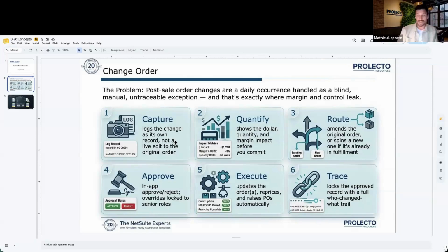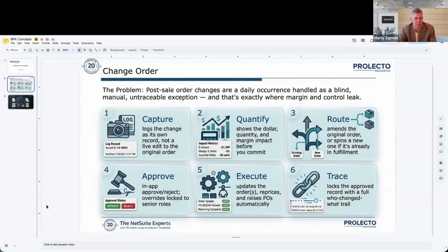Please continue. It's isolated, but I would also add that it's not blind to what's happening. Because think of it this way: if there's miscommunication, let's say, and you thought you were going to replace an item for another item, but that item unfortunately shipped ahead of time, well, you cannot replace it anymore. So the change order is not entirely blind to it. It will not let you submit it because it saw something happen since, and you're not allowed to do what you thought you were allowed to do before. That makes sense. Yes, yes.